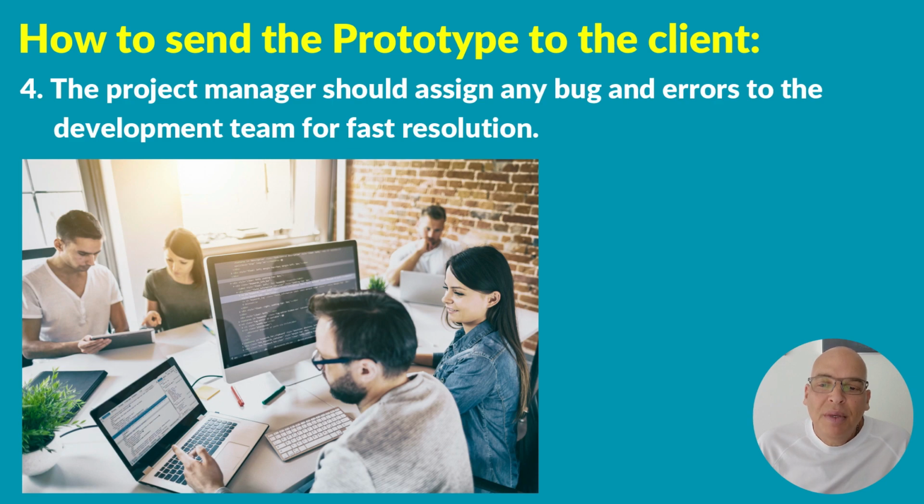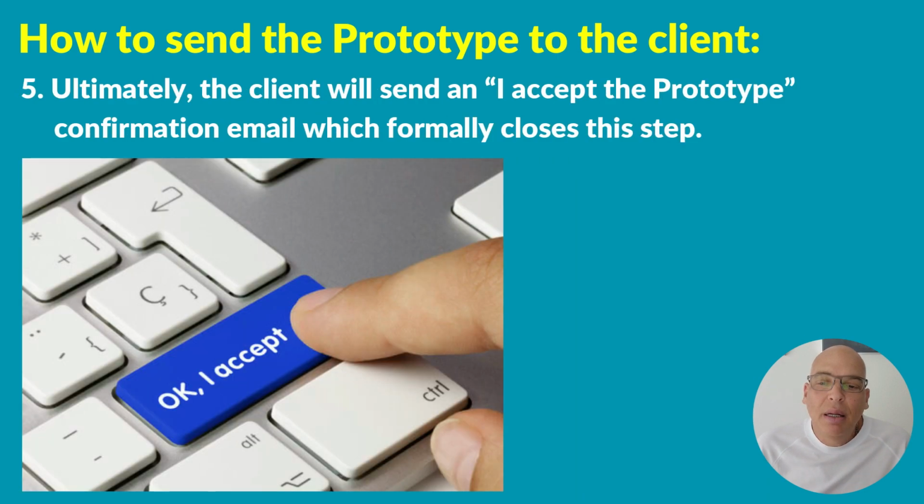Number 4, the project manager should assign any bugs and errors to the development team for fast resolution. Number 5, ultimately the client will send an "I accept the prototype" confirmation email, which formally closes this step.